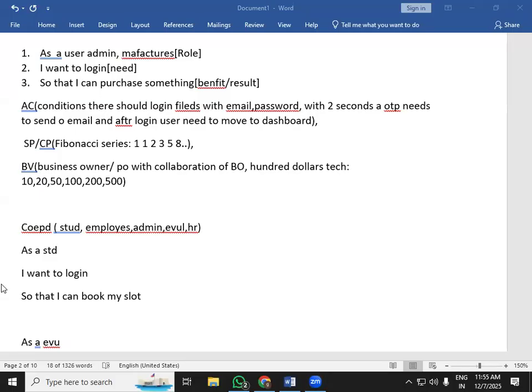Coming to Scrum ceremonies. We have the sprint planning meeting, which is conducted before a sprint is started. In this meeting, they decide what user stories should be worked on in the upcoming sprint. Coming to the daily stand-up meeting, they announce what they worked on yesterday, what they are working on today, and what problems they have faced, so that the Scrum Master knows day by day what issues they are facing and the progress of the project.